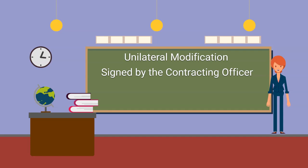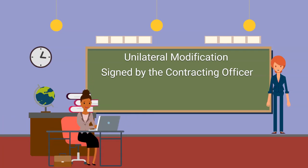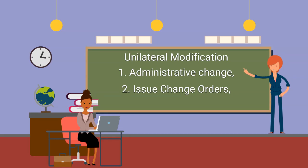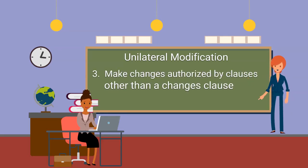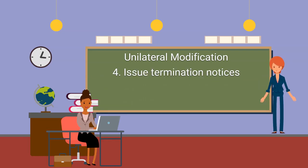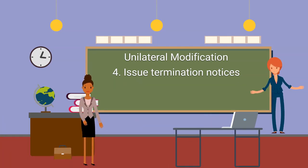Unilateral modifications are signed by the contracting officer. They are used to make administrative changes, issue change orders, and make changes authorized by other clauses than a change clause, such as an options clause or property clause. Unilateral modifications are also used to issue termination notices.